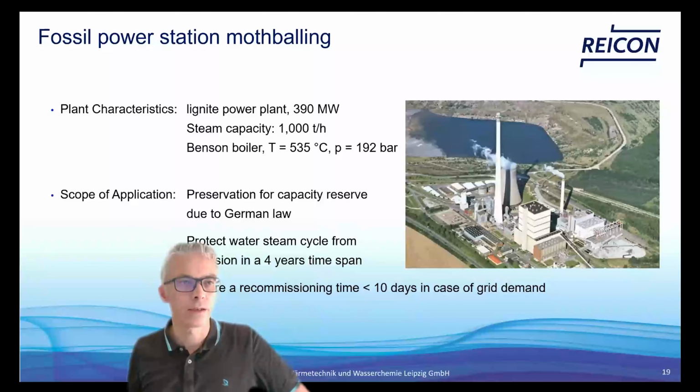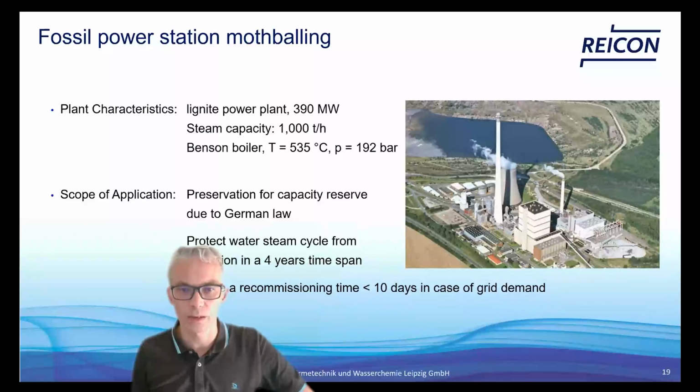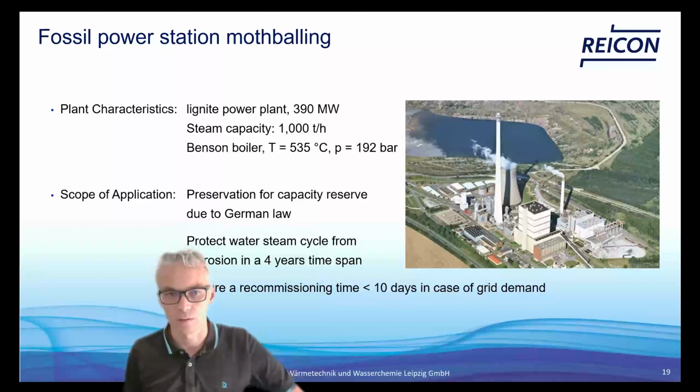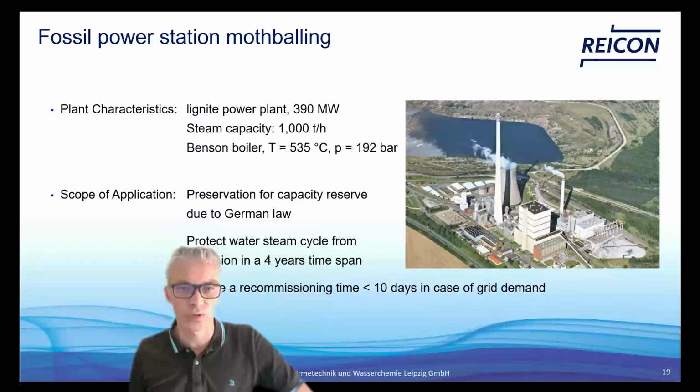The second example is from a fossil power station, which got mothballed due to a German law. As they were lignite fired, they need to shut down, but be available for recommissioning within a 4 years time span. This plant was the first one going into this non-operation capacity reserve.